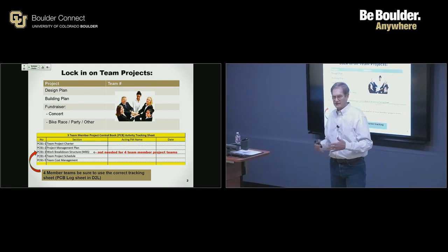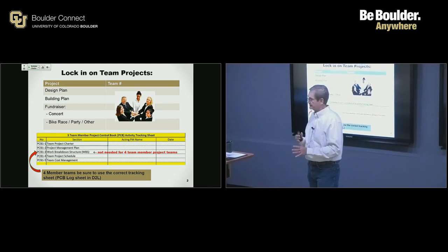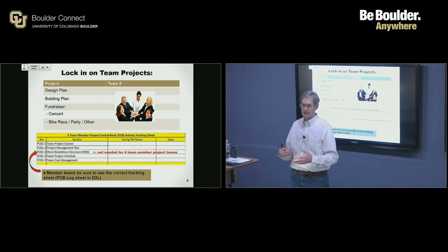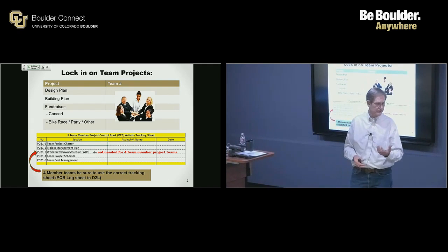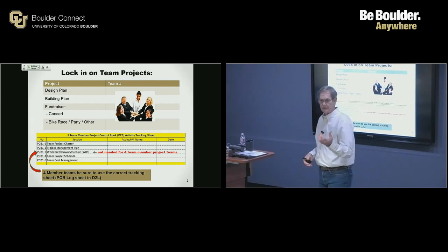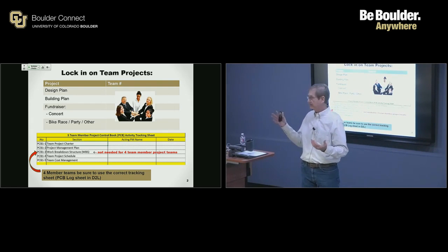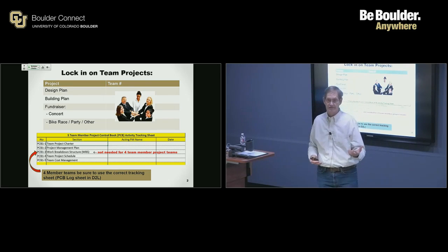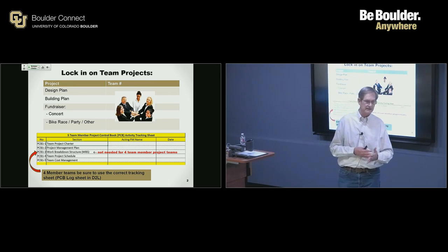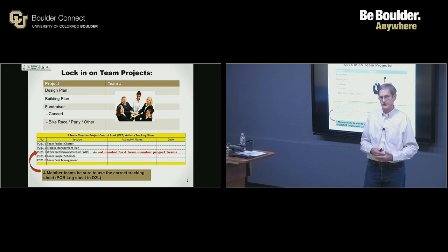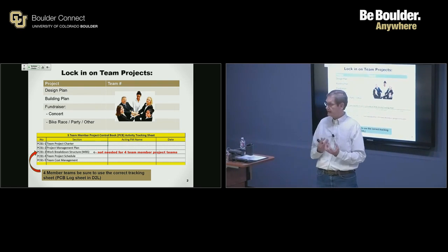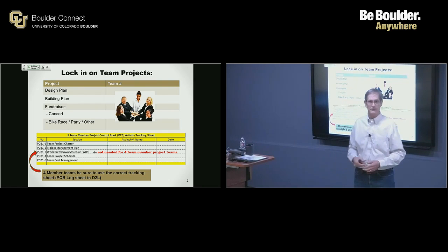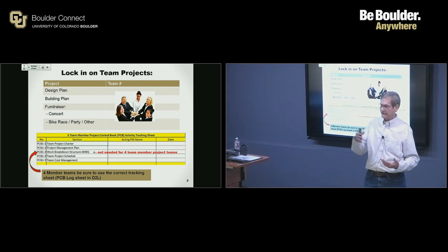But back to what Pepe was saying, a lot of what we do when we manage projects is an iterative process. So we take this first step. Typically it's high level. The charter might be 4, 6, or 8 pages. Maybe we even glean some of the information from a contract that's been signed, or a legislative bill or something that is providing us guidance as to what this project's supposed to do. And so very often we have what we call inputs, information that we take into consideration when it comes time to develop this charter. And then we can take that information forward.